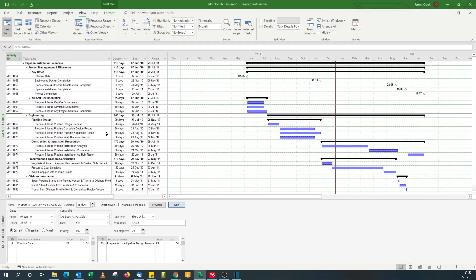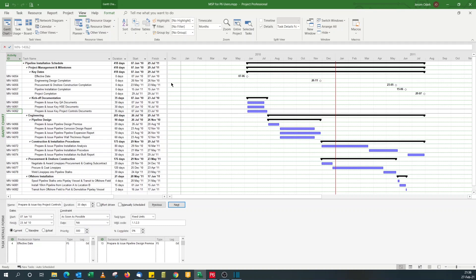Luckily, Microsoft Project comes with custom fields which you can use to replicate P6 activity IDs, user defined fields, and to a certain extent global change.